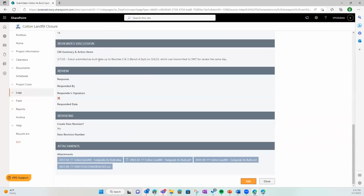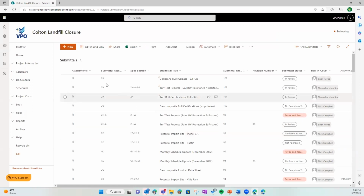So you're going to scroll down a little bit further, and we're updating the discussion, and that's basically the verbiage that shows up in our weekly meetings, right? So every time I get a submittal, I'll update where it is and where it's going and stuff like that. So all I have to do each week when I'm creating an agenda is basically print out this weekly view report, and it lists all the submittals that are open, whose court they are, and basically this summary of where it is.